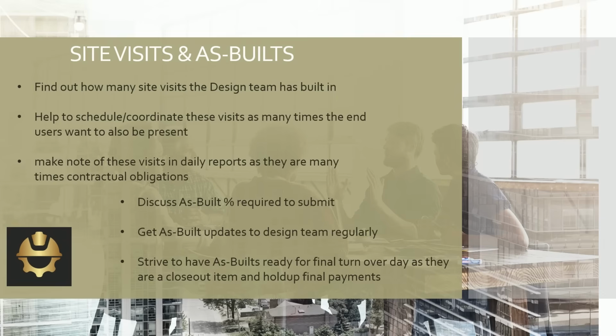You also need to make sure that what they have built in meets contractual. So some end users will say, we want to see the design team on the ground in the dirt with us and you X amount of times. Sometimes they don't ever make mention of it. So it's literally what the design team has built in.